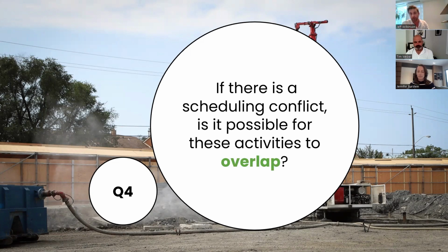Another example for Manderley was, we put all our catch basins in first. Then we had the under slab services guy go away for a few days while you guys did the bulk of your work, and then we had them come back. So I think they are overlapping, but I just kind of caution against banking on putting different trades in the same spaces, because you'll definitely get conflict in that situation.